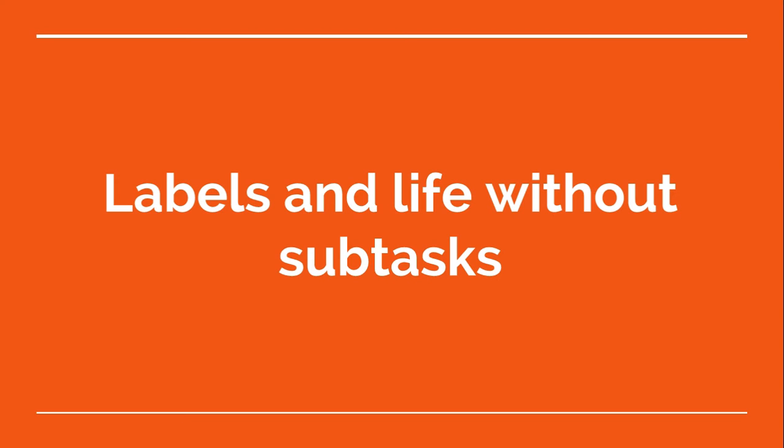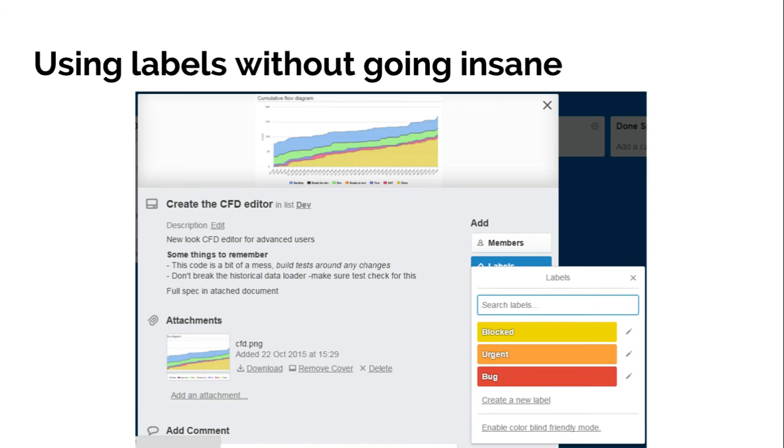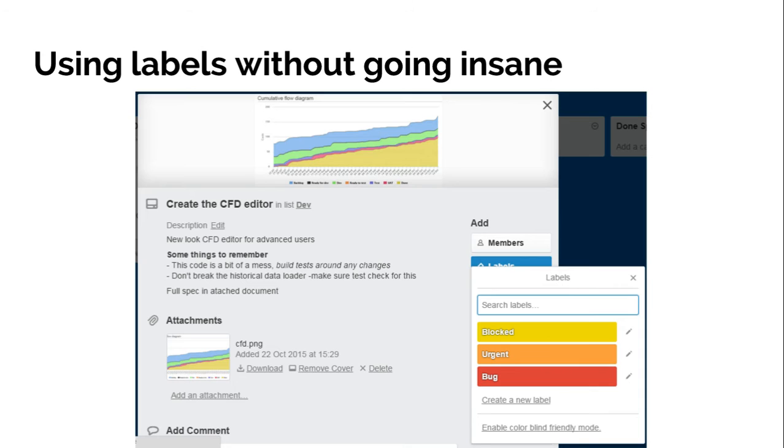So we move on to how people are using labels and how they're dealing without their subtasks in Trello. First off, this is probably a pretty typical setup I would see with people's boards for how they're using labels. The first label people would usually start with is bug, normally red, to help it stand out, and obviously label all your bugs as red, and then you can see where they are on the board. The next one people might add is urgent, whether that's relevant for you or not, you can decide, but just another way of flagging up tasks which aren't bugs, but which are a bit of a priority at the moment.